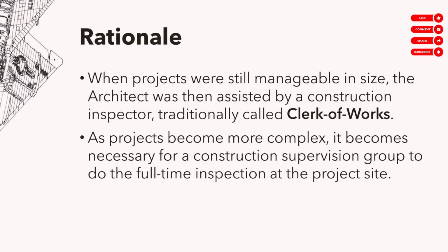But now, projects are much more complex, and it's usually not enough to have just one person do the job of inspection. It's usually a group of inspectors doing this inspection on site. Normally it's different trades yan. One trade, one inspector, meaning may inspector ka for civil works and structural works and architectural works. Minsan magkahiwalay pa yung architectural sa civil and structural. And then you have the people doing the MEPF, electrical, mechanical, etc. So, bottom line, projects are now so complex that it's usually not enough to have just one person doing this job. It's usually a group of people doing the job.